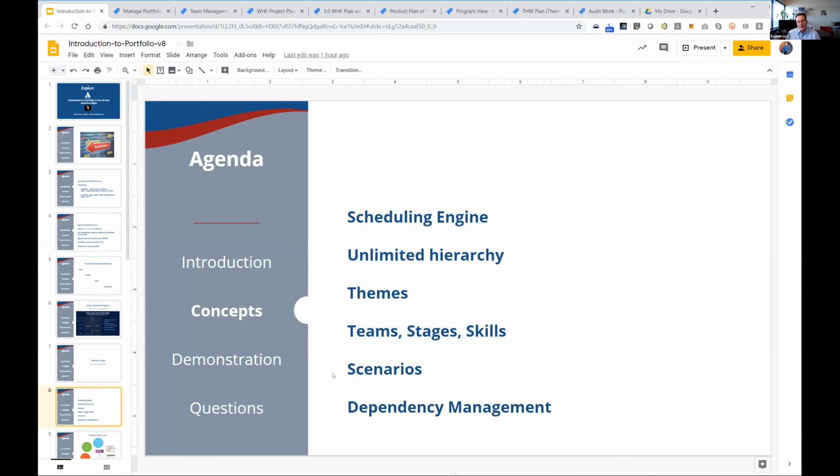Then there's a great feature in 2.x, and again, because 3.x isn't finished yet, we don't know exactly where that's going to land. But this idea of scenarios. So if you think of portfolio data, it's really, if you use a source control kind of model, it's a branch of the data in Jira. So it takes all of the data from Jira, and you can update it, and you can bring it up to date anytime you want by hitting the calculate button.